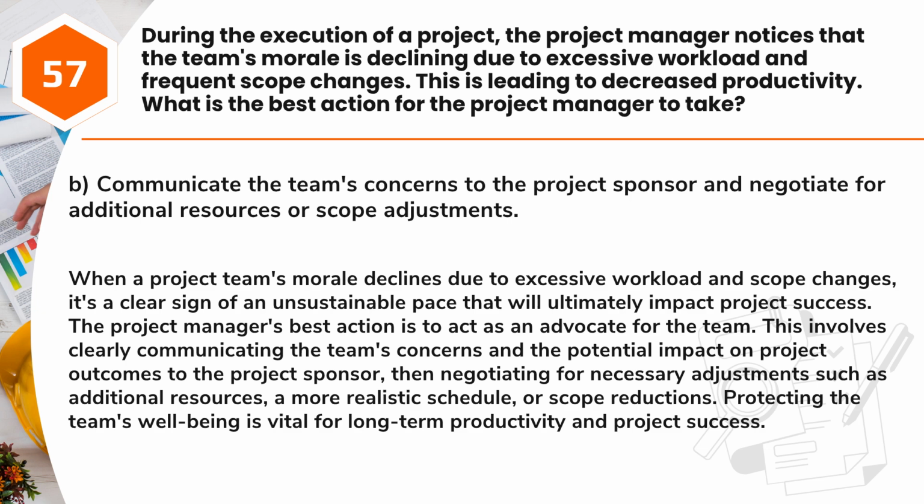When a project team's morale declines due to excessive workload and scope changes, it's a clear sign of an unsustainable pace that will ultimately impact project success. The project manager's best action is to act as an advocate for the team. This involves clearly communicating the team's concerns and the potential impact on project outcomes to the project sponsor, then negotiating for necessary adjustments such as additional resources, a more realistic schedule, or scope reductions. Protecting the team's well-being is vital for long-term productivity and project success.